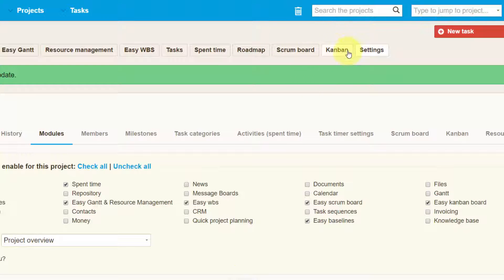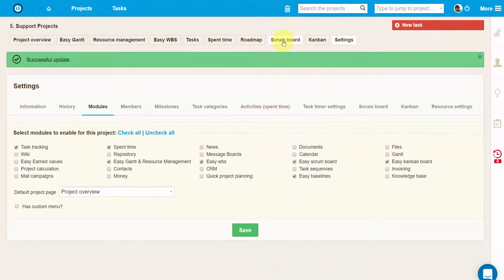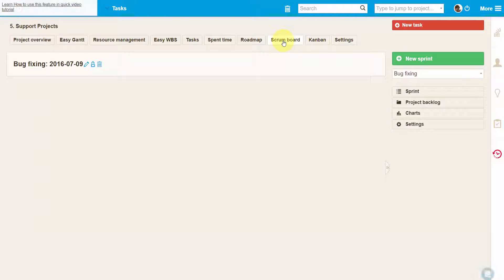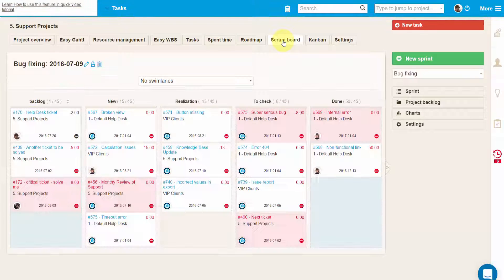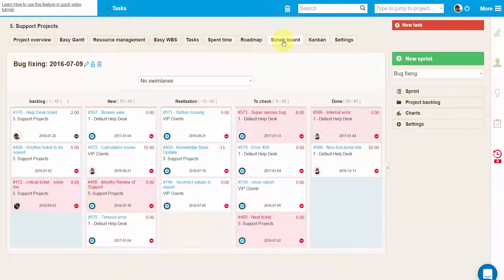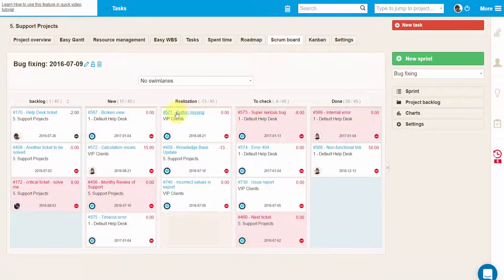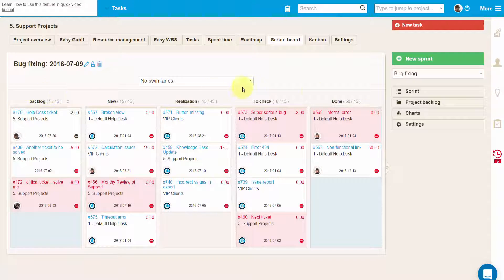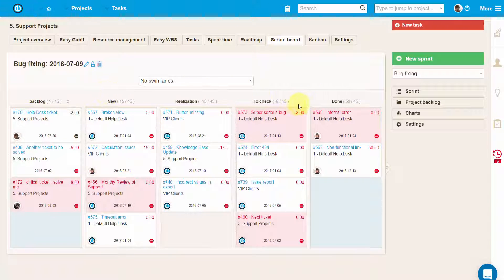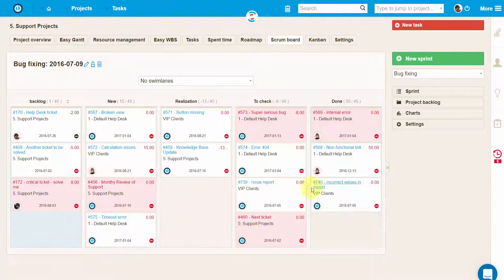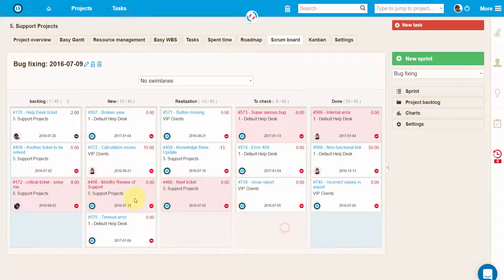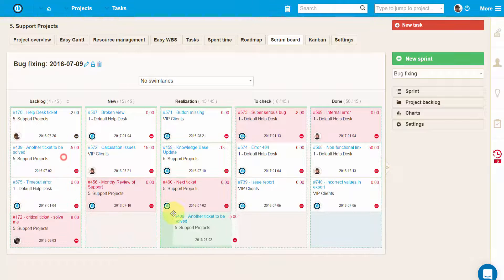Since both Scrum and Kanban boards have similar using patterns, we will take a closer look at Scrum Board. Just click on the tab and you'll see your sprint backlog and different statuses. In here you can basically move tasks from one status to another using simple drag and drop.